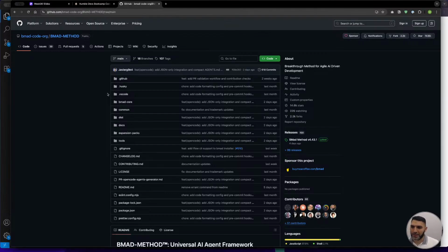And this is where we've landed now in version 4, where there are a number of distinct agents that you can utilize to plan, document your plan, architect based on the plan, create tasks for AI, again based on your plan and your architecture document. And then when all of that is done, you then tell AI to implement every single task that is there, because all of these will have been planned and pre-planned and structured, and will have criteria that will tell them, okay, this is what you need to implement.